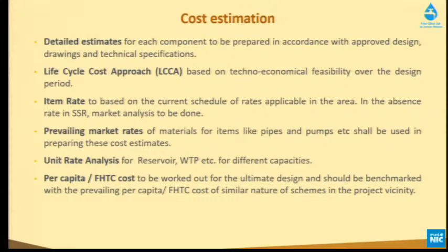And when we calculate our per capita or FHTC cost, see what the benchmark is, and whether whatever cost I'm arriving at is aligned with what it should be optimally. So every state should have its own benchmark. If I have this kind of terrain, this kind of profile, what should be my optimum FHTC cost? Based on that, we can moderate the cost.